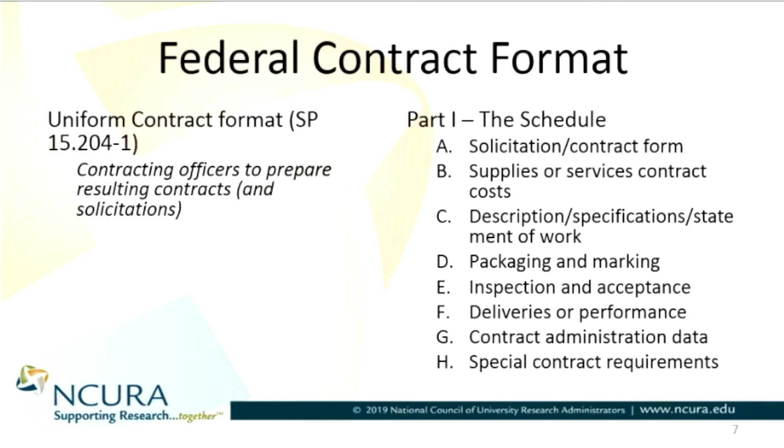And if we didn't take into consideration all of the costs in that scope of work and cost them all the way out, we don't have the ability to rebudget on a contract that you do on a grant. So you can really forecast problems if you're not looking at things differently because you're dealing with a different model.